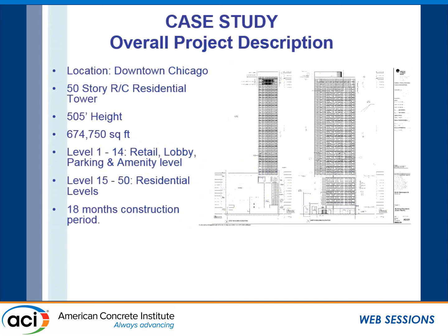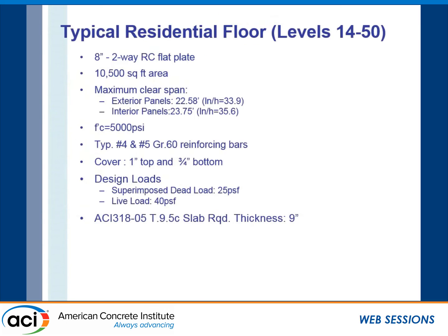Here's a case study of a project we did in Chicago, recently. This is a 50-story high-rise in Chicago. It's 505 feet in height and roughly 675,000 square feet. The podium, which is levels 1 through 14, is a mix of retail, lobby, parking, and amenity levels. Above that, levels 15 through 50 are residential levels. The construction period was 18 months.